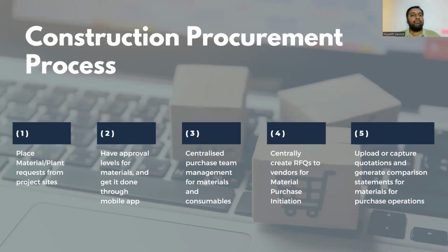If the procurement team feels like this material cannot be procured with the budget we have, it is important for this team to be transparent, and you should go to the client and say that, you know what, this material we cannot get at this price because that material is extinct or it's not available in the vicinity of the site, huge delivery charges, or in terms of lead time. Lead time means the duration between purchase order and the delivery. So if it is something that needs to be imported and it takes 2 months to get imported through ship, but the project is only 10 months.